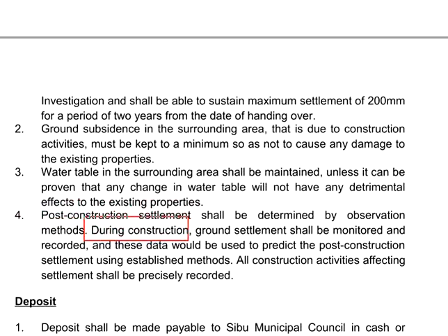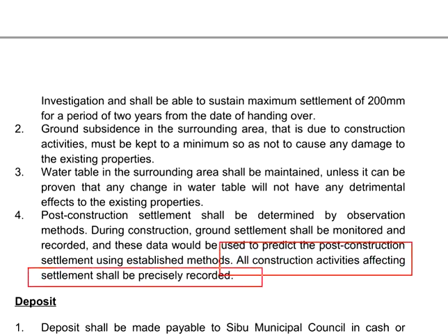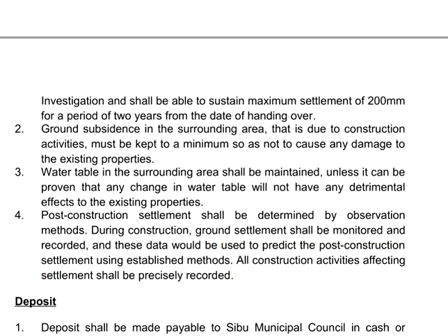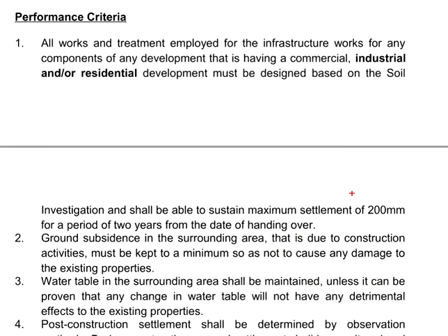However, during the construction, the ground settlement shall be monitored and recorded, and these data will be used to predict the post-construction settlement using established methods. All the construction activities affecting the settlement shall be precisely recorded. Having the important performance criteria established, now the solutions will be up to the developer.